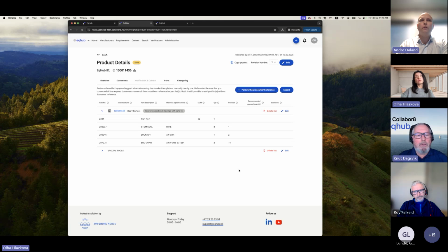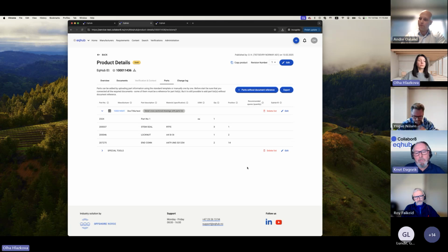Knut, do you want to answer that? Yes, I can answer that. So I think for what you have on parts, maybe you don't have unit of measure on the part list, but when you get into SPIR, you definitely need to have a unit of measure on the items that you're actually going to procure. So it'll be mandatory when you add the commercial data, but at this level where you're just getting the structure of all the parts, we haven't made it mandatory yet, at least, but it will be when it gets into the SPIR view. Okay, good clarification, thank you.